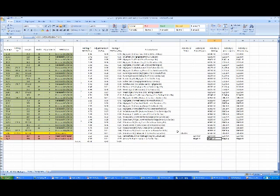They come in daily and input daily reports. And that's being reviewed by your inspectors, if I remember correctly. That's exactly correct. Our inspectors look at the work that's reported in the Contract Manager daily report, sign off on it, and approve it. And there's a little bit of journaling behind the scenes. The contractors keep copious notes about what they do, and our inspectors keep copious notes about what the contractor does, along with load tickets on asphalt and stone and payment items by the ton. All those activities are journaled and then used to approve the daily report in Primavera.